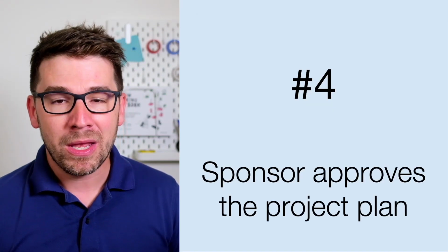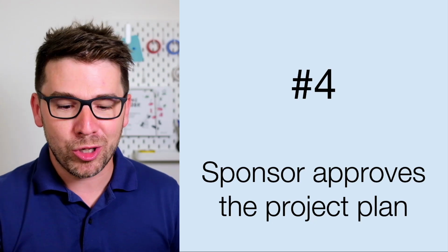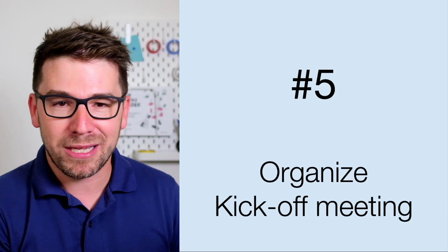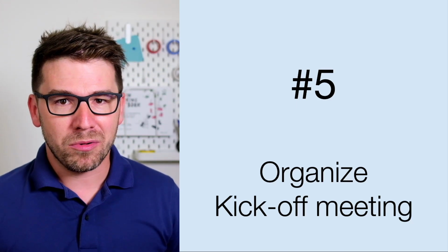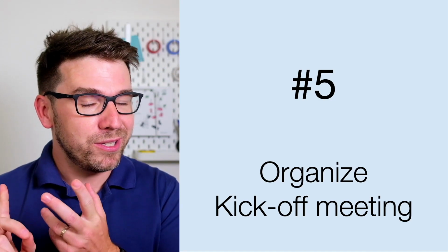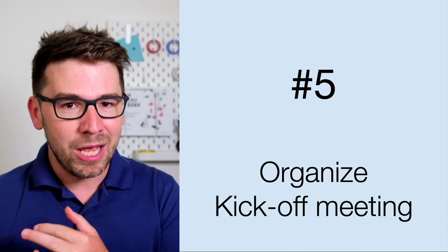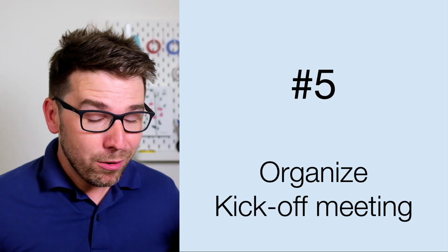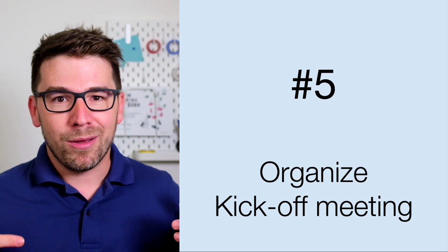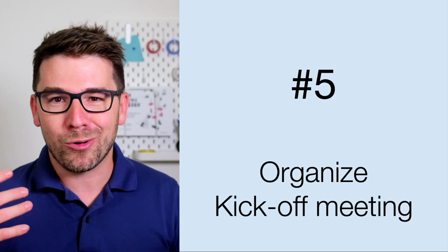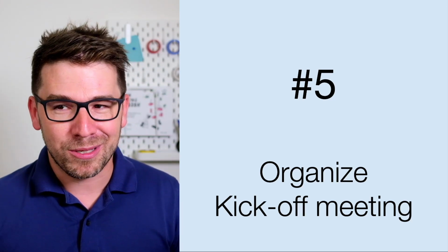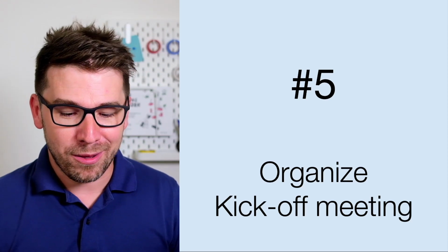Step number 4, sponsor approves the project plan. As soon as you have the project charter and the project plan ready, you can get started. And you can do it, step number 5, by organizing a kickoff meeting. In the kickoff meeting, there should be a sponsor or a steering committee invited, project team members or other important stakeholders, and just explain to them what the project is about, show them the project charter, show them the project plan, answer all the questions. And after the kickoff, you can continue.